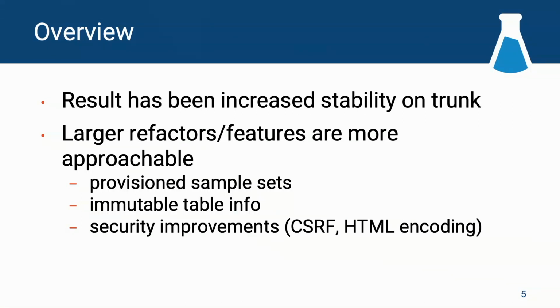And so we would move from destabilized builds, and in the 4th and final month of our release cycle, we would dedicate a lot of time to stabilization. We actually called it the stabilization sprint.